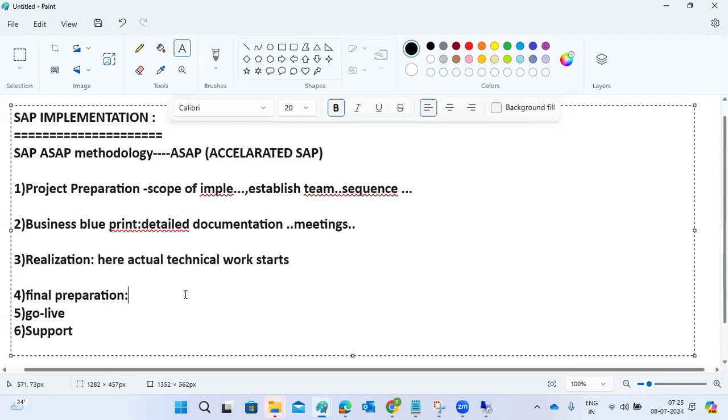So you are starting a food business and you require the SAP applications. You have to install the SAP system in a proper manner. Data center preparations, where you have to store the data, are also required. Once the SAP system installation is done, in the final preparations we do the final configuration, if anything is pending, and plan how to go live and when. End-user training, how they accept the orders from the SAP system, cutover activities, and other tasks required for a successful go-live.